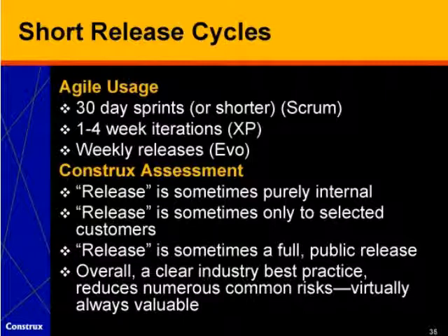Moving to shorter release cycles addresses any number of common risks. It addresses technical risk. It addresses integration risk. It addresses proof of concept risk. It addresses management risk, like knowing what the status of the project is. It addresses the risk of not knowing until very late how much progress you're really making. And so I think we've seen that even in strong stage gate environments, even in environments that are mandating strong sequential approaches, finding some way to move to shorter release cycles, whether you're in business systems or safety critical systems, short release cycles are valuable almost all the time, virtually all the time.